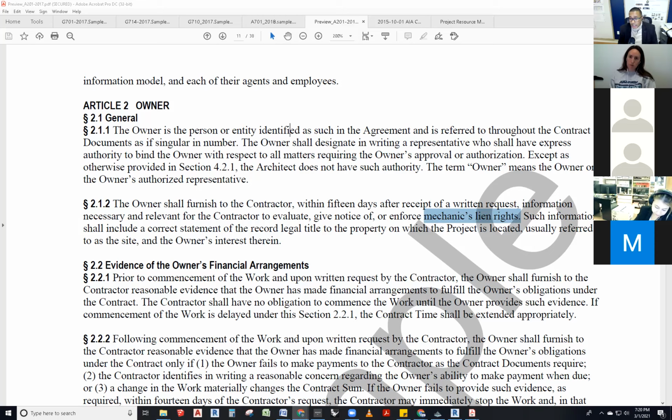We basically could put a lien on a property because we're designing on that property something. And if we don't get paid, we'll place the lien. And there is a time for that, though. You can't just place it whenever you feel like it. There's a time from which the contract was breached, or you haven't been paid, or when the disagreement happened. It has to be about payment. Like you haven't gotten paid. Something's going on with payment.